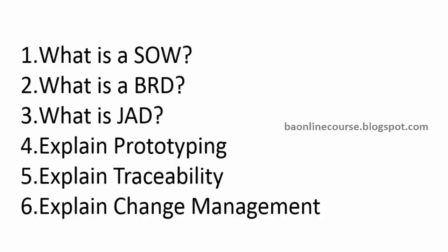And now when it comes to change management, it comes up when your customer wants some change in his application. For example, he wanted just three applications in his software, but later on he wanted 15. So now there is a change. So you sign a document with him, which is called the change requirement document, which states that you are going through this so and so change, and you will take this document to your change control board and get their permission to change it.